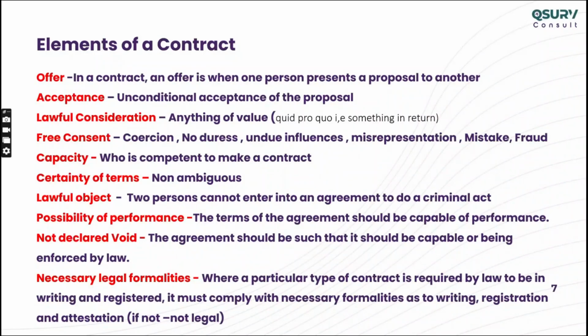Then the possibility of performance, that's what you mentioned. Firstly, there's the pre-qualification. You do pre-qualification to ensure they are able to perform the work. It's not for competency. There is a legal contractual element hidden behind the pre-qualification. Okay, so these are the 9 major things you have to ensure before you open a contract.